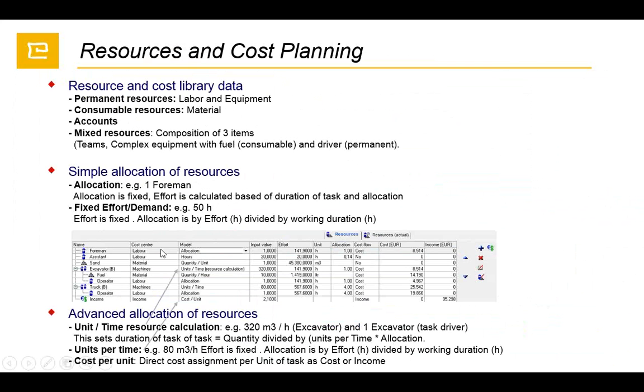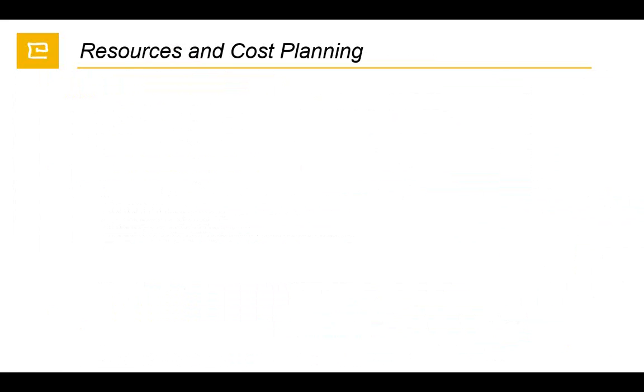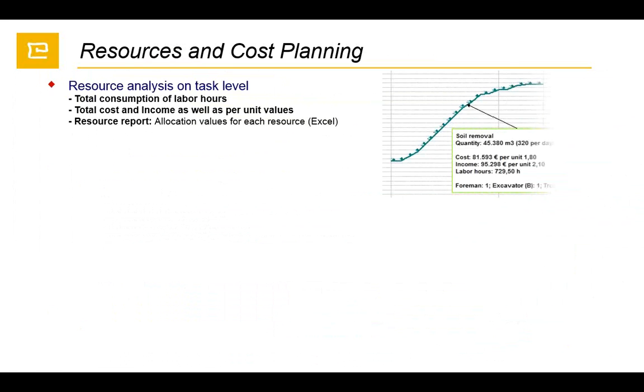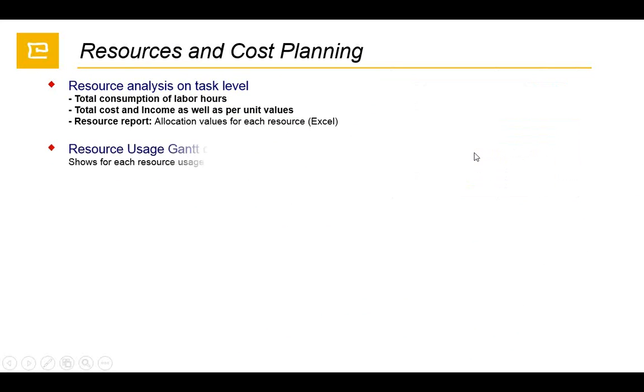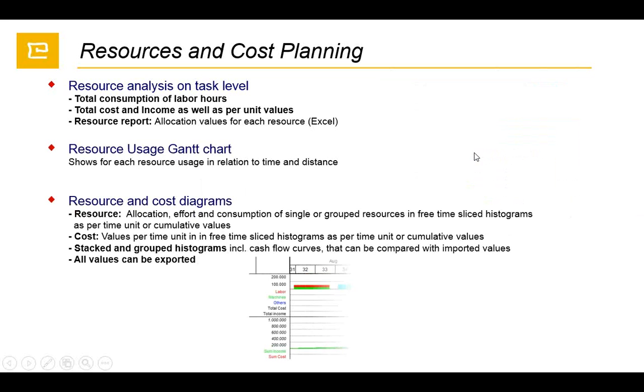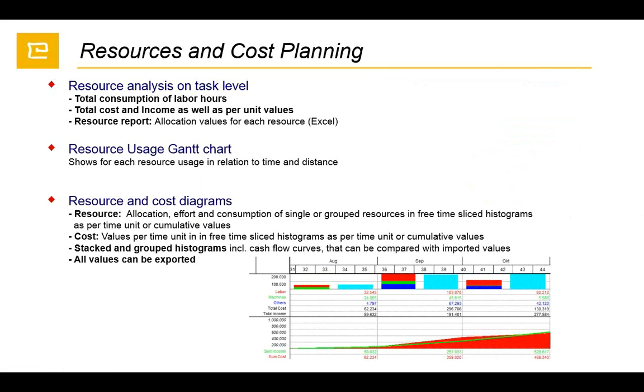There are calculation methods, resource calculation. This enables you to adjust to your project, so your logic will always be supported using the modeling types. We can quickly get the information in the annotations, and we can get our histograms based on time. In addition to time, we have distance-based histograms. In the same way, we can get the system to display cost and resources based on distance.